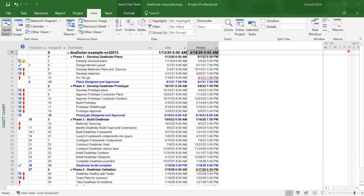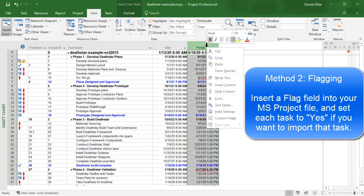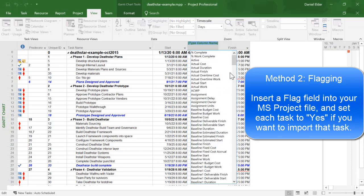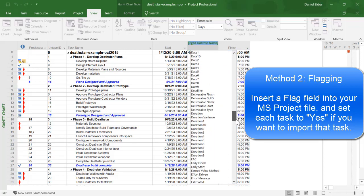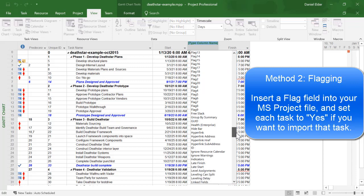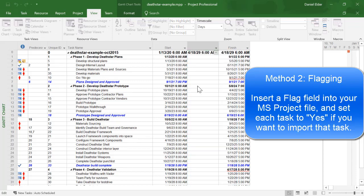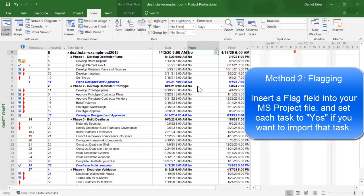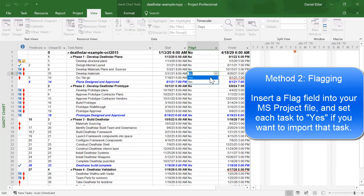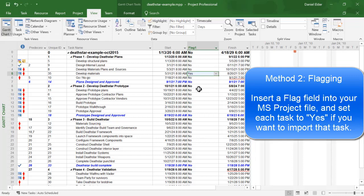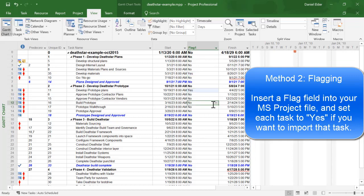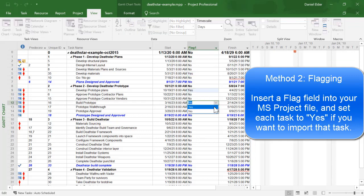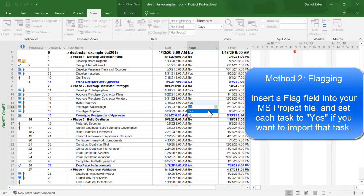The next method is known as flagging. For this method, you will need to insert a flag field into your project file. I will insert a flag1 field. And then you will need to set each task to yes that you want to import. For example, I will set a few tasks to yes right here.